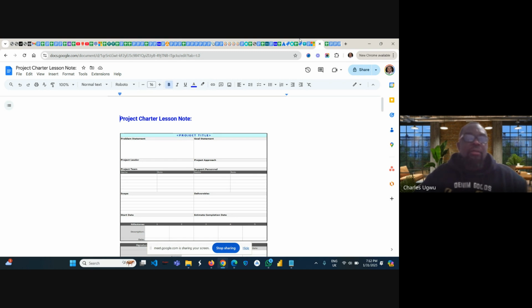And to plan, the project manager will quickly come up with authorization. Approving the business case is different from authorizing you to start the project. So the project charter is a document that formally authorizes you to start the project. It's not mandatory, but it's important.